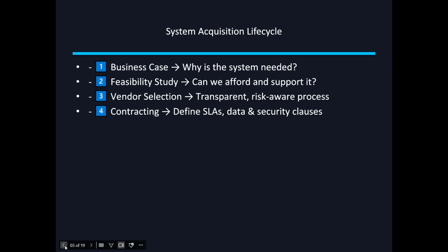After the feasibility study, after you evaluate these questions, there's a vendor selection and RFP process. Organizations typically go through a request for proposal process where vendors submit bids. Bids include what their solution actually provides, what the cost of the solution would be, and more descriptive detail on the solution. This is a place where the risk actually hides.